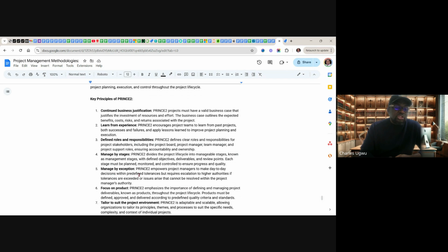Manage by exception. PRINCE2 empowers project managers to make day-to-day decisions within predefined tolerance, but requires escalation to higher authority if tolerance is exceeded or issues arise that cannot be resolved within the project manager's authority.